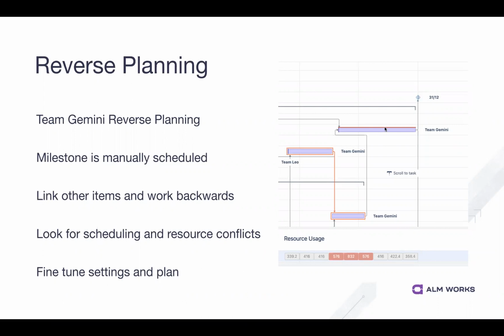And then this is actually available as an attribute. It's probably one of my favorite Gantt attributes to use. We can just say, give me the Gantt scheduling error field. And 90% of the time, we expect that field to be empty, saying there's no error, things are fine. But when we do see there is a Gantt scheduling error, we know there's going to be a red hat. We know that there's going to be some sort of error.